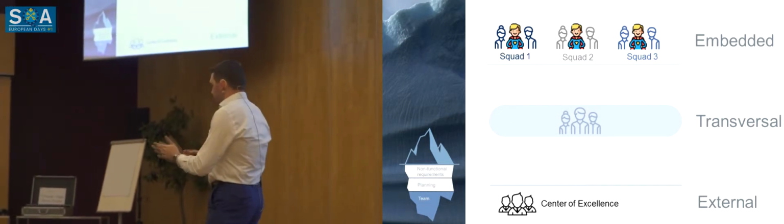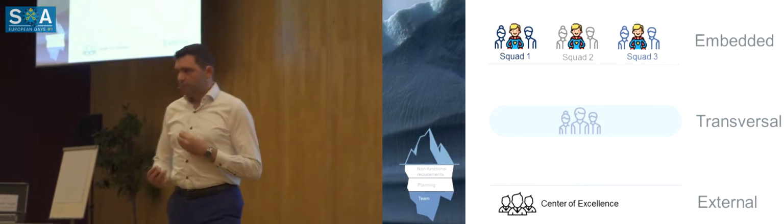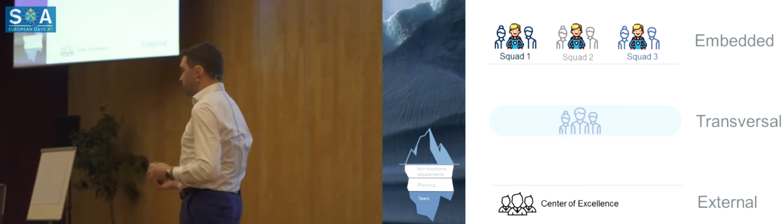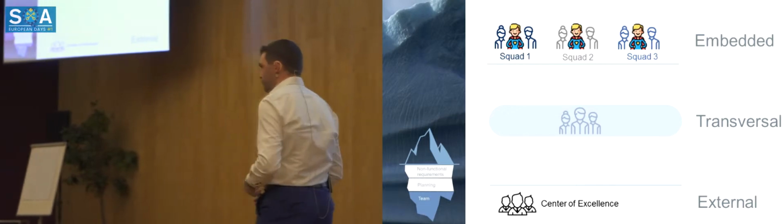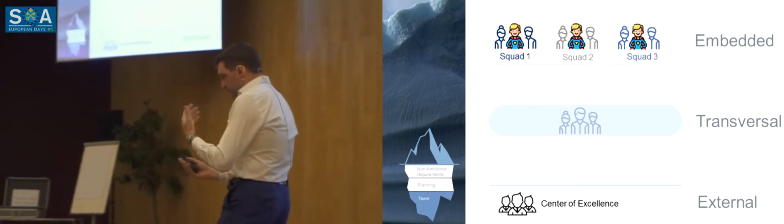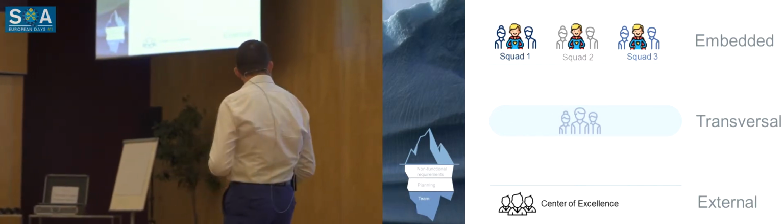We did performance testing for agile and non-agile projects. The problem was that our planning was, because we made a planning, but that was not always related or aligned to the planning of a sprint. So often we noticed that it was not enough, 3 runs.